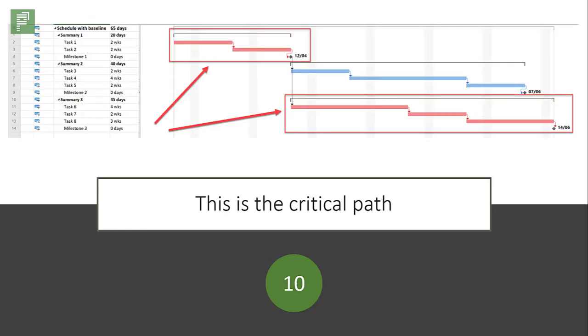This is the critical path. If the duration of anything within this path changes, the end date of your schedule is affected. Make this critical path your priority.